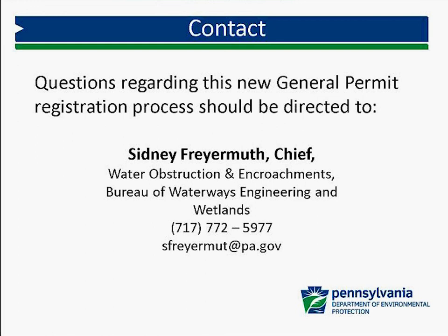Clarify, all proposed impacts to wetlands in counties with known occurrences of bog turtle still require a Phase 1 bog turtle survey, not just areas with bog turtle hits? Unless I'm reading that wrong, if you're proposing to impact a wetland in a known bog turtle county and you do not get a clearance, a bog turtle survey may be required by U.S. Fish and Wildlife. As I said before, you would need to contact, at this time, a bog turtle surveyor, and determine how to proceed with that.